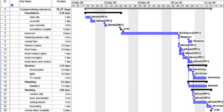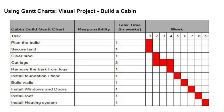A Gantt chart breaks down a production process into all of its key components. Here we have a typical Gantt chart. I have an example of a cabin build. If we ask ourselves what are the things required in order to build a cabin: first, we plan it; second, we get a piece of land; third, we clear some land; fourth, we cut some logs; fifth, we remove the bark from the logs; sixth, we install a foundation or floor; seventh, we build the walls; eighth, we install the windows and doors; ninth, we install a roof; and tenth, we install a heating system. This is for illustrative purposes only — I don't build very many cabins — but you'll get the gist.